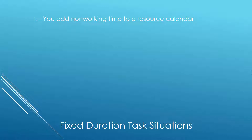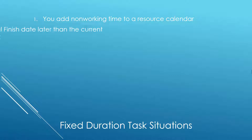One: you add non-working time to a resource calendar for a resource that is assigned to a fixed duration task. Two: you enter an actual finish date that is later than the current finish date of a fixed duration task.